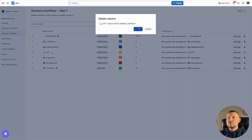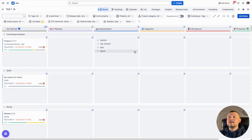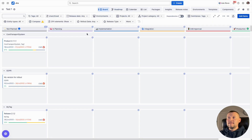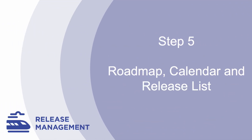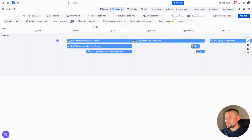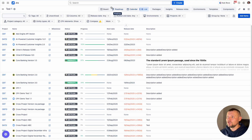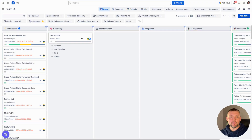After saving, we can see the updated workflow on screen. For example, I have removed UAT, so the UAT status is no longer available. Note that we can remove statuses only when there are no items within that status. At this stage, we can also start using other views such as roadmap, calendar, and list view in addition to the standard Kanban view.